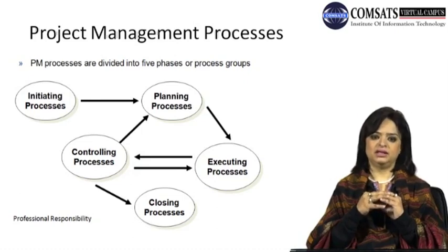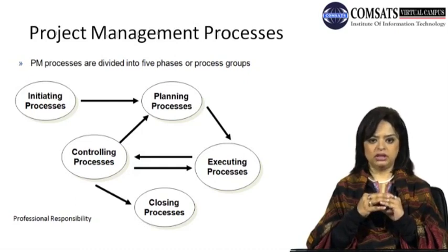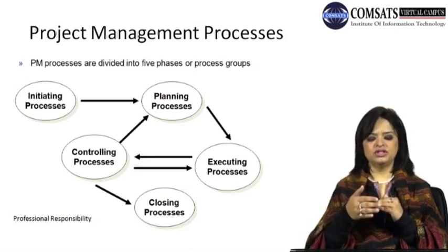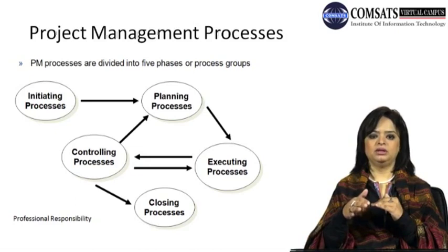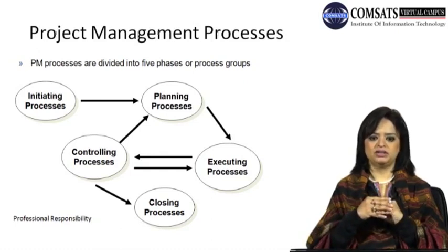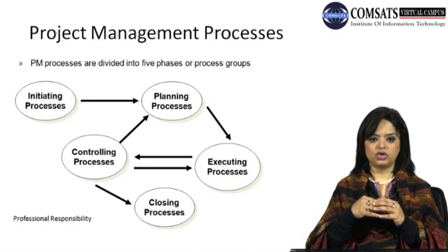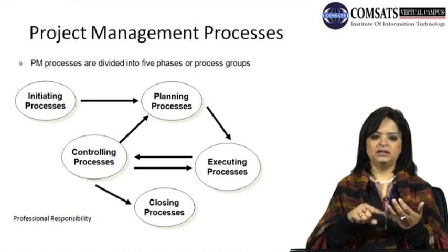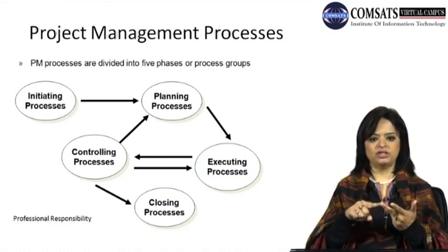Any variances that are happening at this point in time need to be documented, need to be controlled, and put in the status report so it can be dispersed effectively throughout all the stakeholders, so everyone has an understanding of why certain variances exist, if there is a plan to get back on track, or it would eventually lead to the delay of any of the constraints, either needing more money, more time, or missing some of the original or intended scope or requirements of the project.